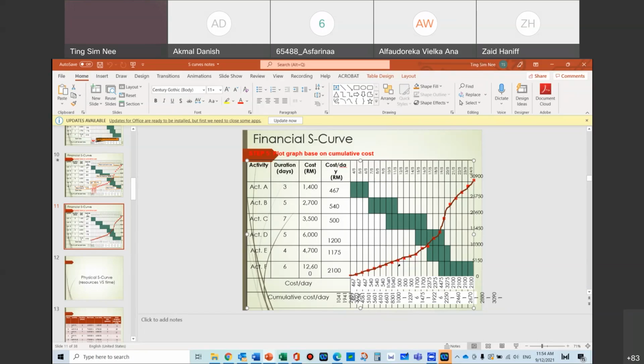But this cash flow thing, you're rolling out a lot of cash every month. So if you are not careful, suddenly your bank goes empty and then you're supposed to pay all your subcon, but you haven't received any payment from your client for over 6 months already. That could be a big, big issue. That's a big alert that you're going to have a cash flow red zone coming up. And then you cannot afford that. Okay.